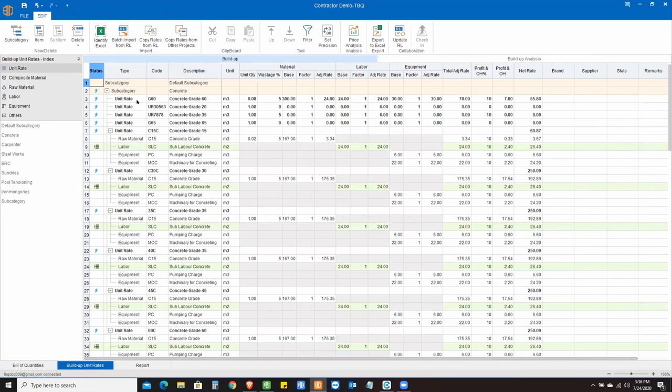So this particular interface, as you can see, you can import some data from the resource library. You can then identify in Excel unit rates or unit rates that are available with you in your company. So you can identify that, and it will just give you a particular breakdown like this.